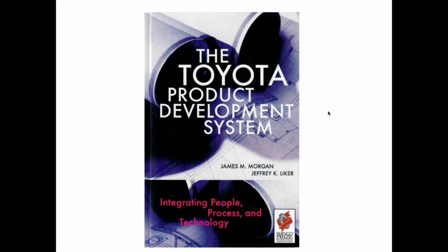And instead of putting together Gantt charts that really detailed all those different pieces, they would have product integration milestones. And these product integration milestones would typically be twice as frequent as a typical automobile manufacturer.